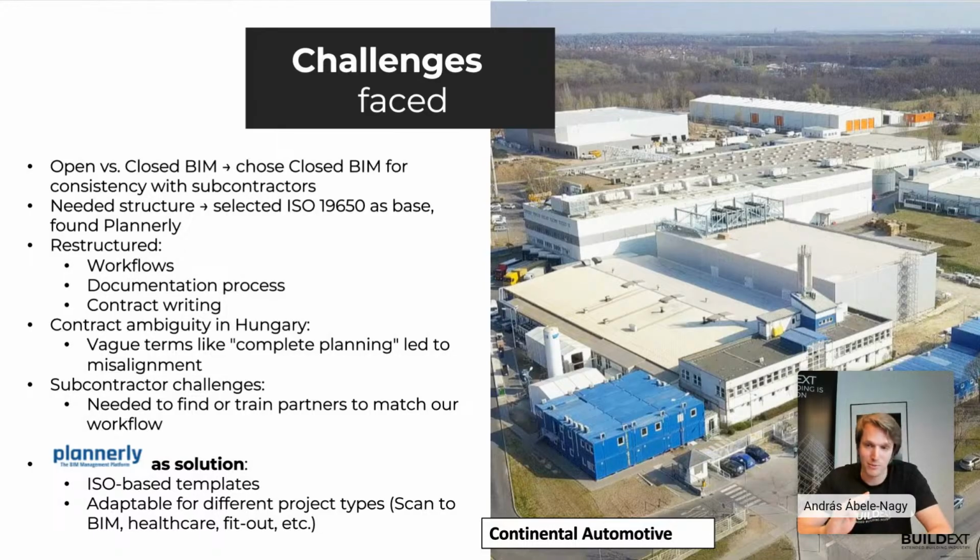One of the main challenges we faced was on the contracts side. The contracts were very vaguely specified. They said something along the lines of "complete planning", which could mean one thing on our side and a completely other thing on the client side. And it could create a lot of problems, especially as the concept of BIM wasn't very well understood on the client side. And the same kind of problem came with the subcontractors.